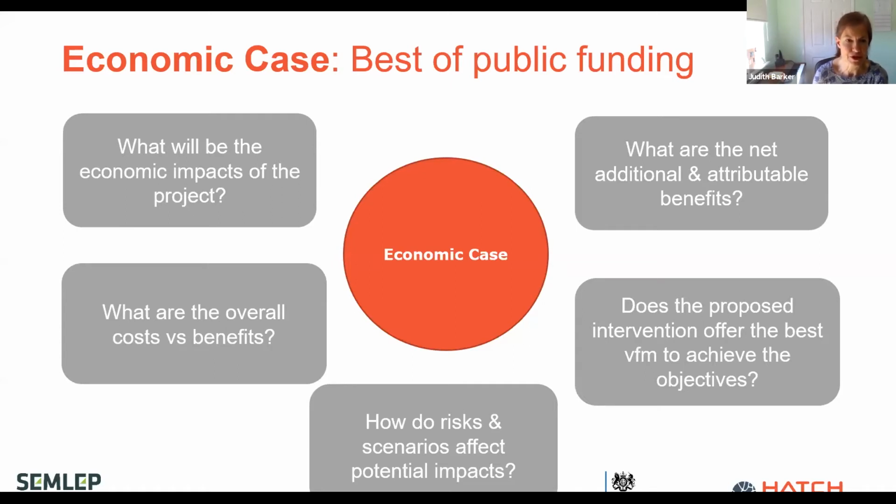So it really is that time when you set out what are the impacts, outputs, outcomes that you're aiming to achieve. And critically, what you're doing is you're saying this project is going to cost us, let's say, £500,000, and you're going to put a value on what the benefits are that you're going to deliver. So that might be jobs, that might be learners, it might be business space, it might be all sorts of things that could flow from either a capital or a revenue project, but you're going to put a value on them, and then you're going to compare that with the cost.